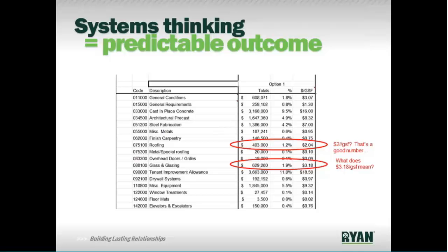Inherently, and we talked about this with the archive training if you sat through that, the way that we manage cost budgets from a contract perspective through construction is not a very good way to manage cost planning and forecasting, or to look at building costs from an early stage. And so we're left living in two systems. One is the systems and Uniformat basis for cost planning. The other is the MasterFormat, or cost code, or contract basis for managing construction projects.